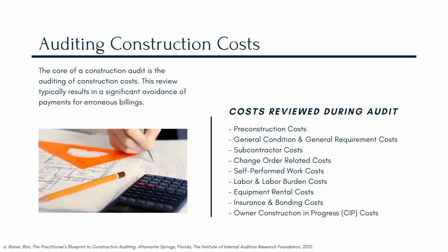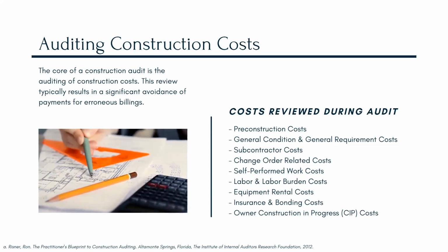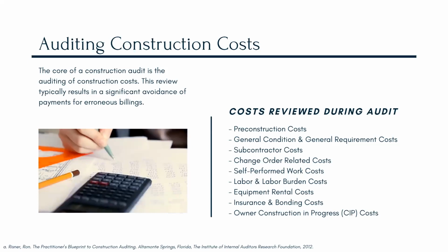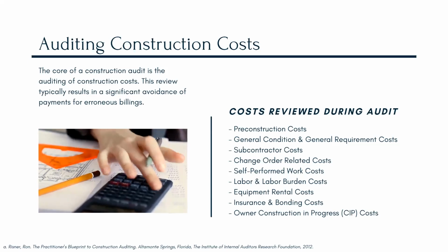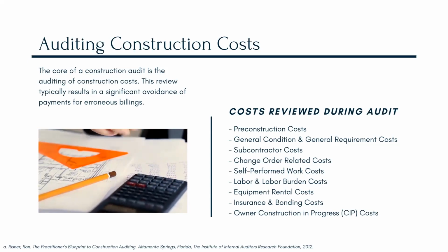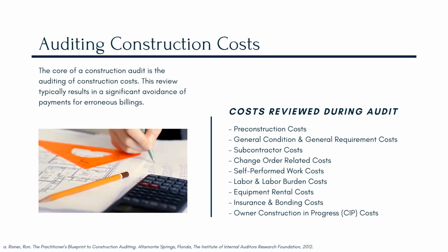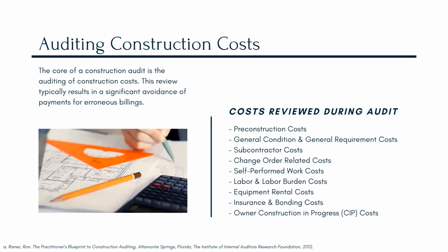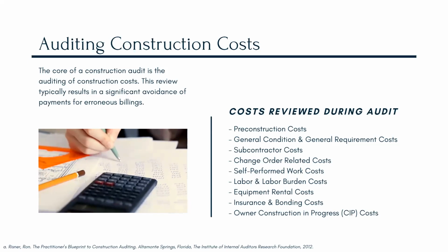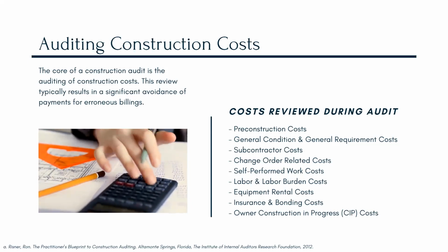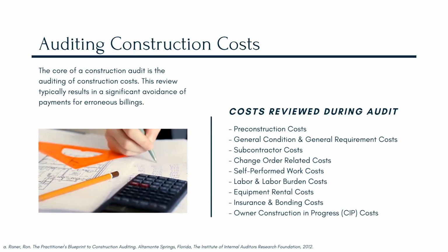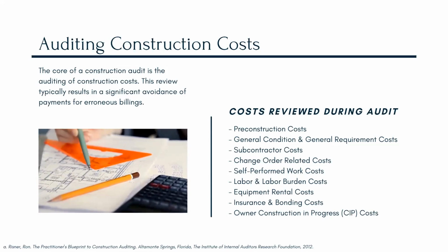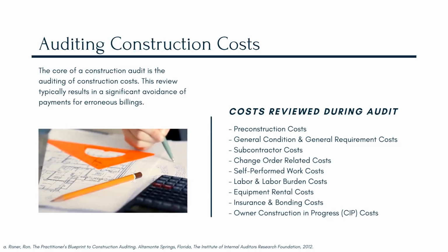Starting with pre-construction costs. So what are pre-construction costs? Those are typically the costs incurred in the design phase or preliminary to actually contracting with the general contractor and getting the construction project underway. For example, doing land surveys on the land where the construction project will take place, other consultation fees, the architect fee, and legal fees in reviewing the plans and the specifications and the contract templates. These are types of pre-construction costs that are real costs incurred by the owners that can be part of the all-encompassing audit scope.